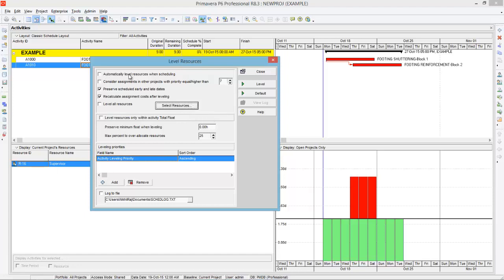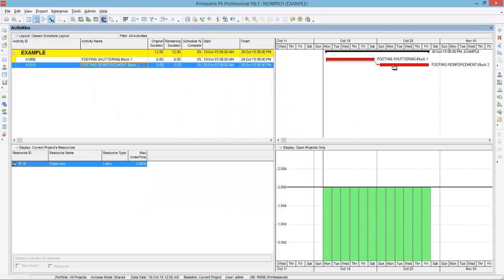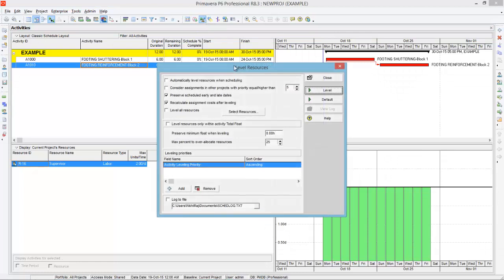I never use the automatic leveling option. When you press level, the program always pushes the duration of activities — it pushes the activity so that the total project duration increases. You can see the leveling has been done, but this is the problem in Primavera. Not only in Primavera — every program that has no idea about practicality always pushes the activity like this.